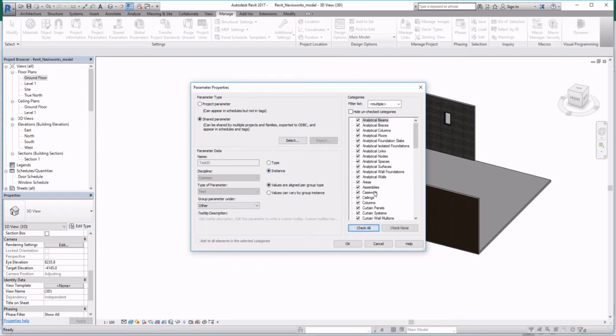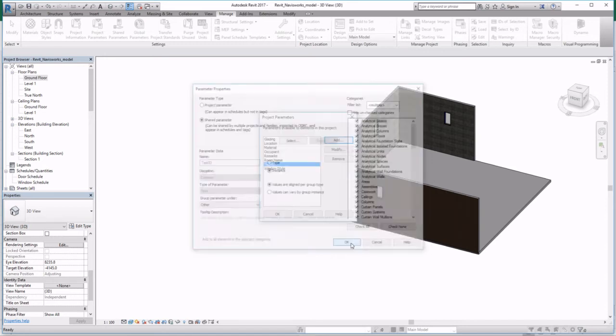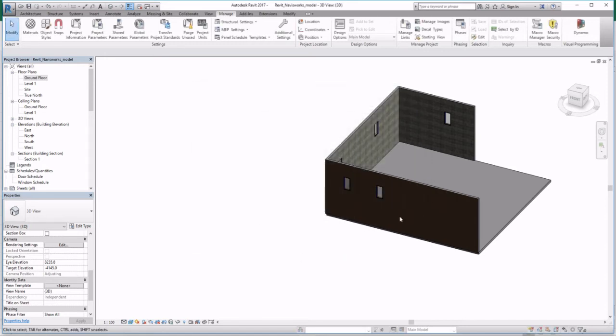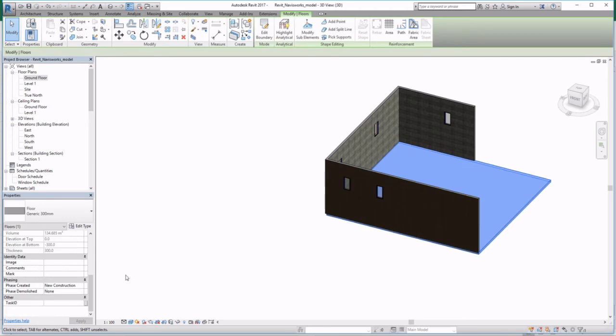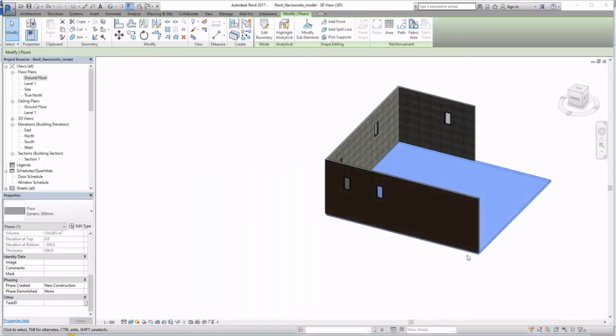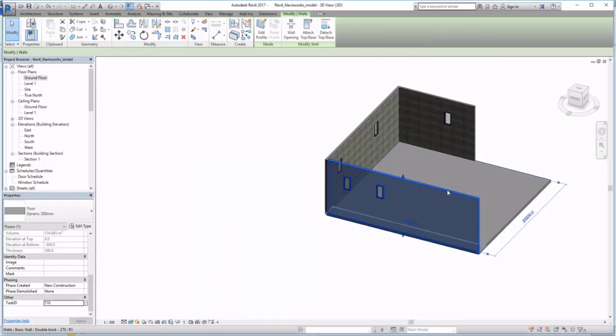Then make sure it's an instance. Check all so that you include it into all categories. Click OK. And now once you click on the floor, you see that there's a Task ID. Now copy that Task ID from your schedule into this field.